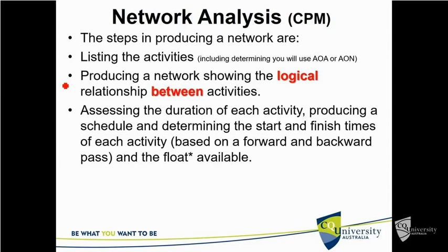So we can produce a schedule and we can work out then the start and the finish times of every individual activity. We do it 2 ways. We do a forward and a backward pass just as a check on each other, and we identify if there's any float available, any sort of additional time that's there we can play with. And we can also assess the resources that are required.